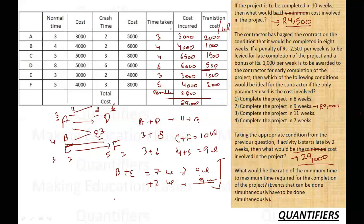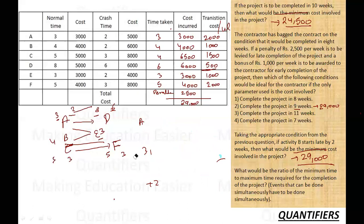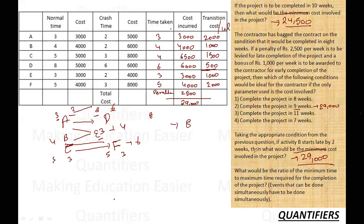Question 4: What is the ratio of minimum time to maximum time for completion of the project? For minimum time, use crash times: A = 2, D = 6, so A+D path = 8 weeks. C+F = 3+3 = 6 weeks, and B+E = 2+2 = 4 weeks. The bottleneck is A+D at 8 weeks, so minimum time is 8 weeks. For maximum time, use normal times: A = 3, D = 8, so A+D = 11 weeks — the critical path. Maximum time is 11 weeks. The ratio of minimum to maximum time is 8:11.